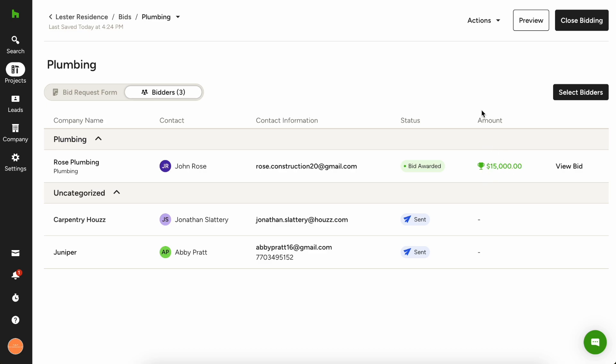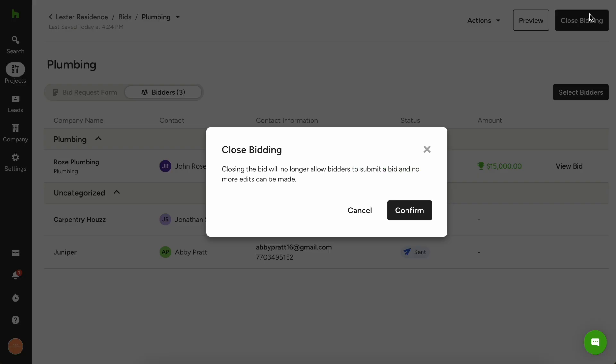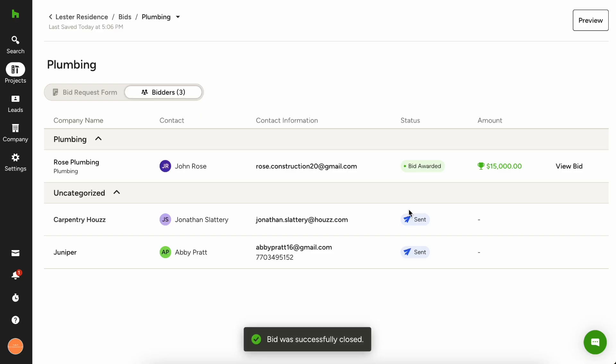When you're done and you're ready to close out this bid package, you just hit close bidding in the top right. At that point, nobody else will be able to submit bids and no additional edits can be made from then on. So just hit confirm. And then your bid is successfully closed.